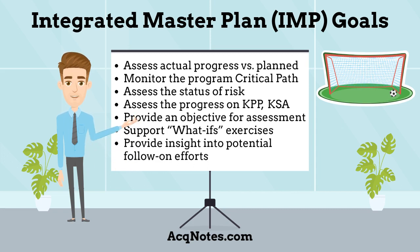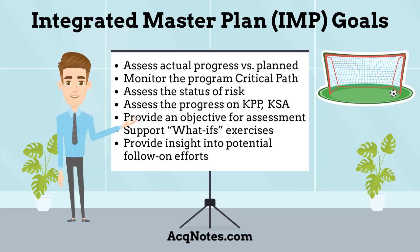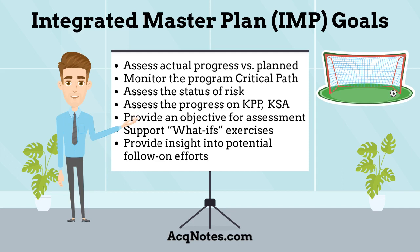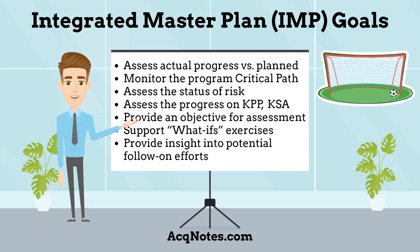Additional goals include: assessing the progress on selected key performance parameters, key system attributes, and technical performance measures; providing an objective, quantitative basis for the contractor's performance assessment rating and award fee; helping develop and support what-if exercises and identify and assess candidate problem workarounds; and finally, providing better insight into potential follow-on efforts that are not part of the original statement of work.